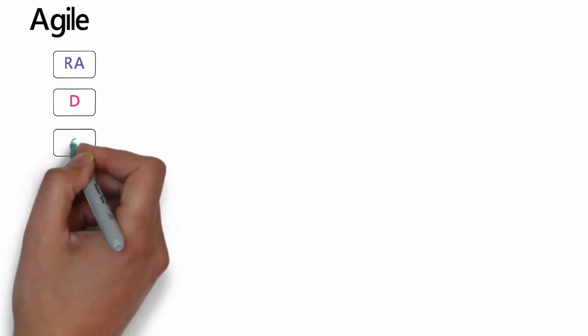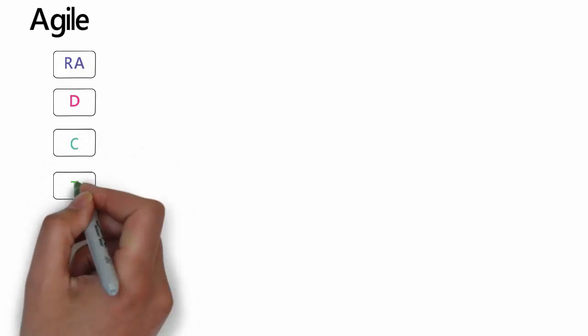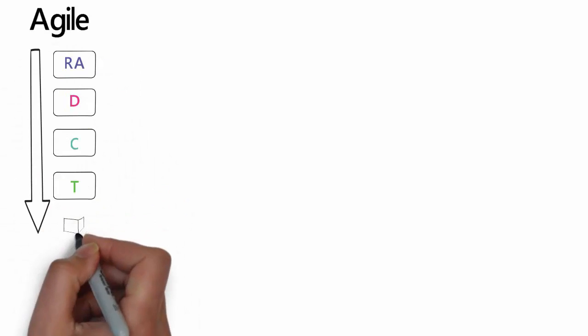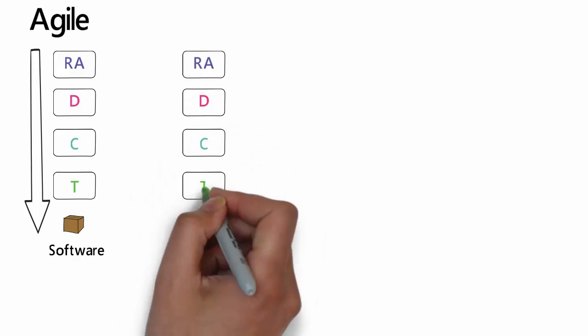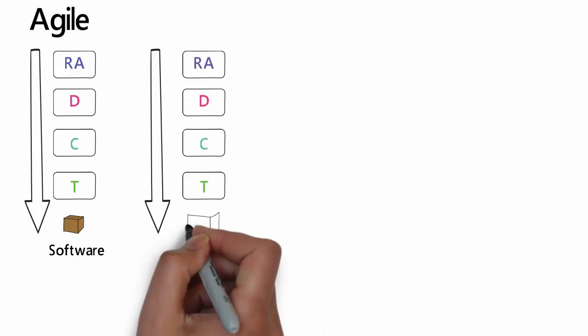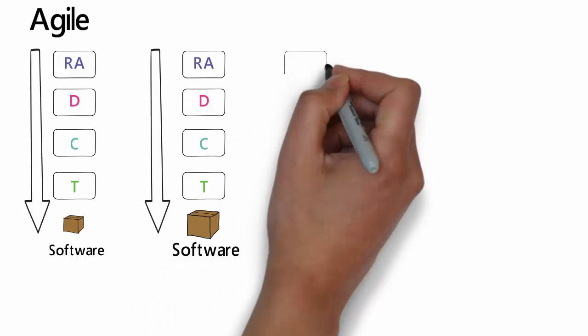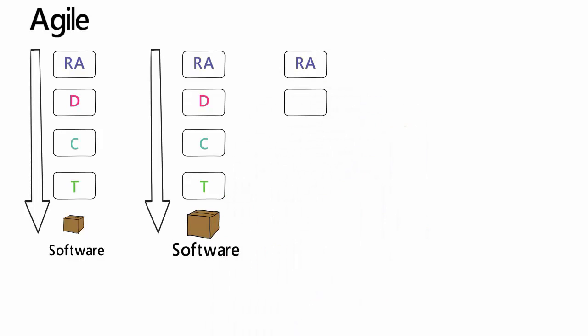Now let us see how the Agile process will help the customer to eliminate all the disadvantages in Waterfall model. The Agile process consists of multiple iterations. In each iteration, customer will identify the high priority requirements for the development team to work. The team will understand those requirements, perform design and coding. The software is then made available to the customer after testing.